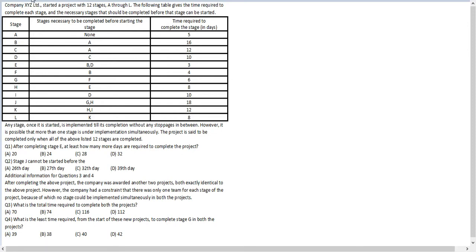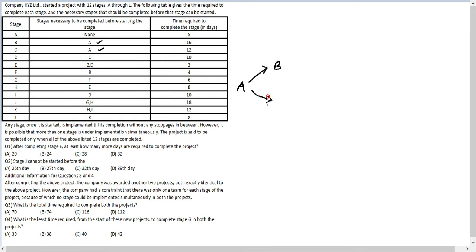The best way to proceed in such questions is to first record all the data in a diagrammatic form. So A is done first, then after A is done, B can be done and C can be done. Then D can be done after C.